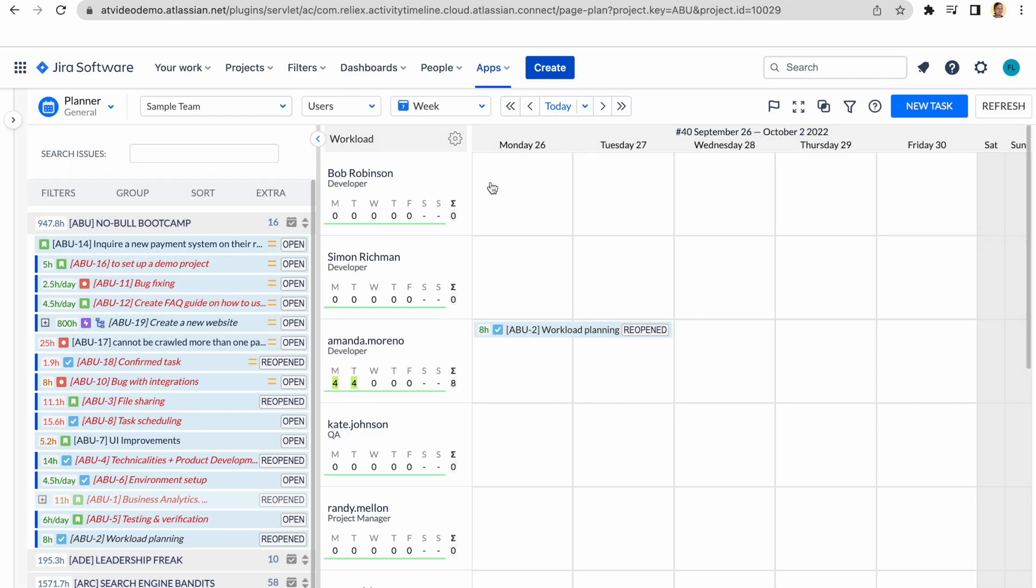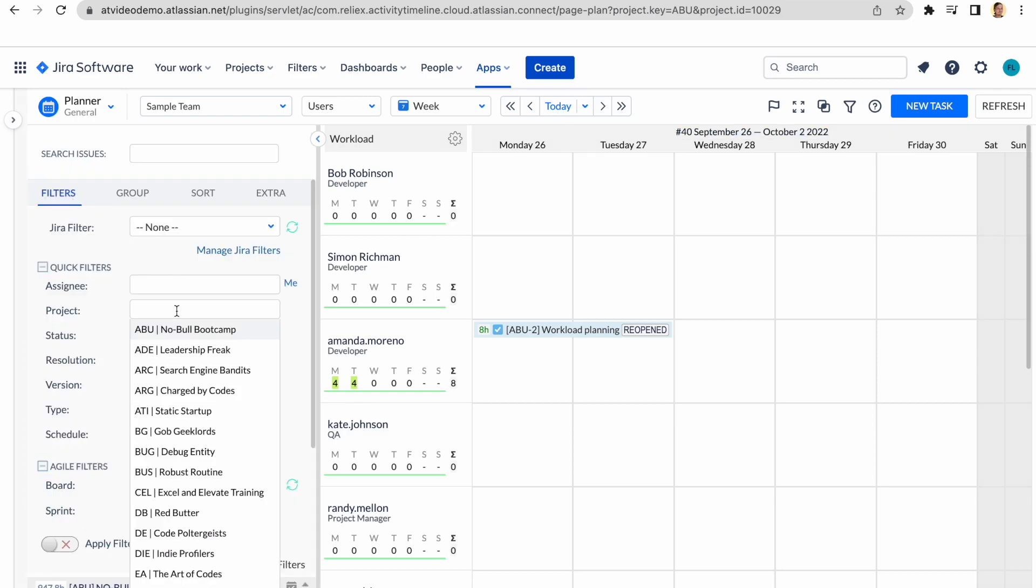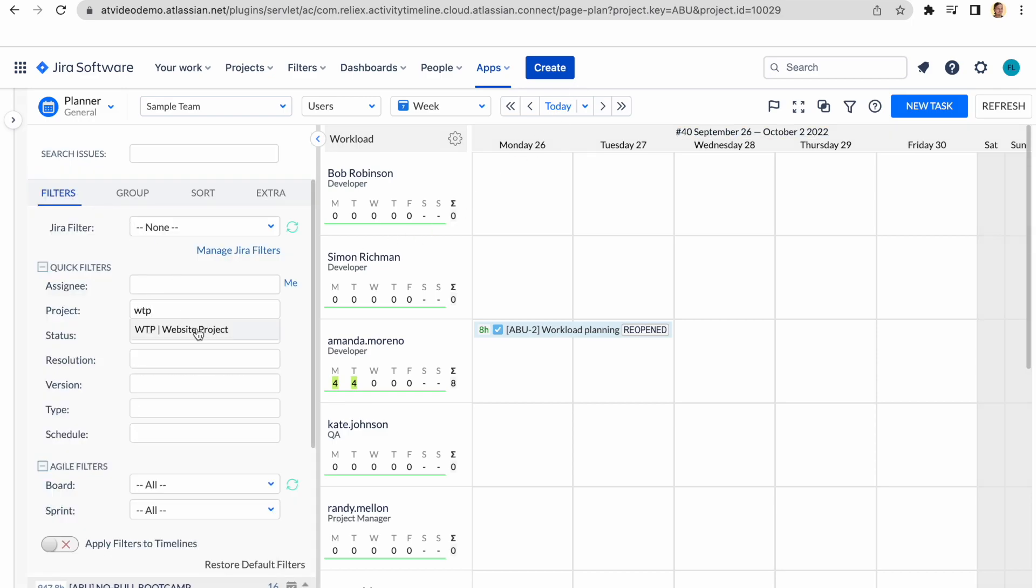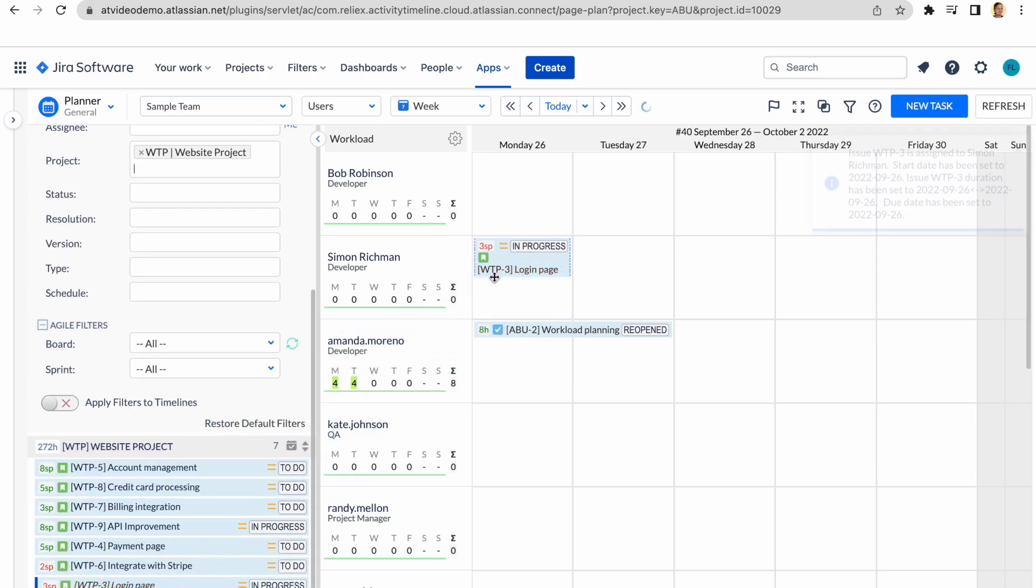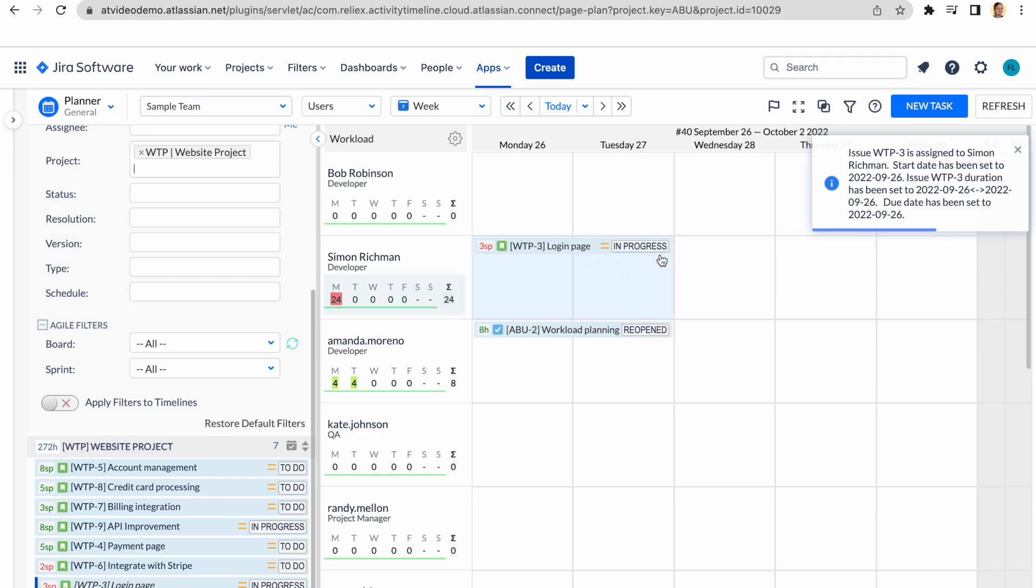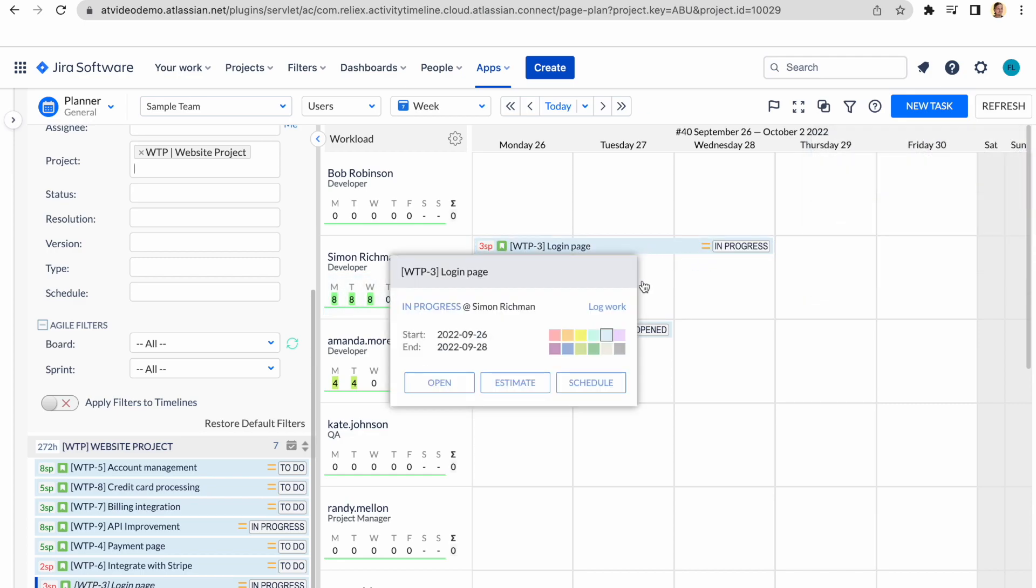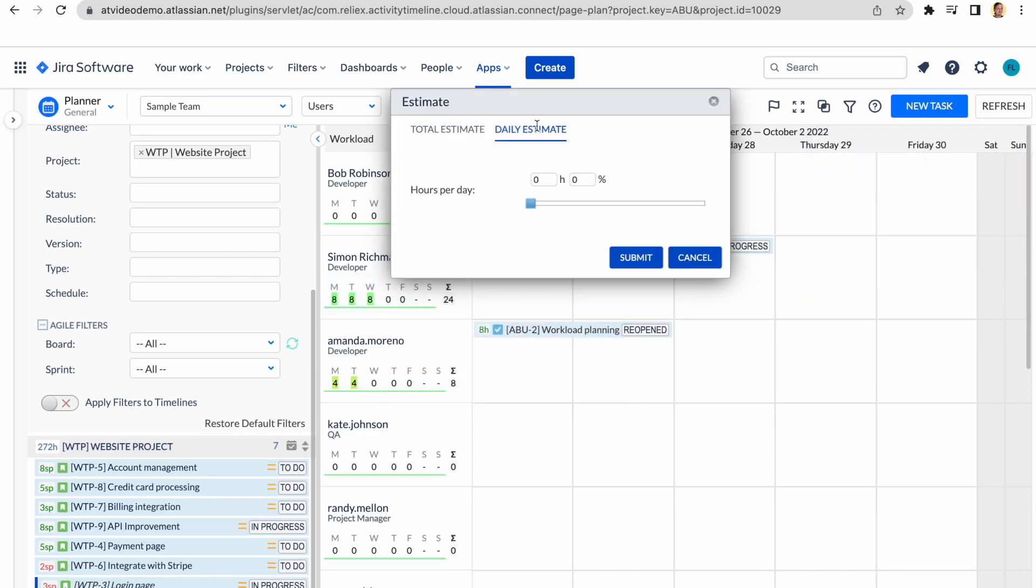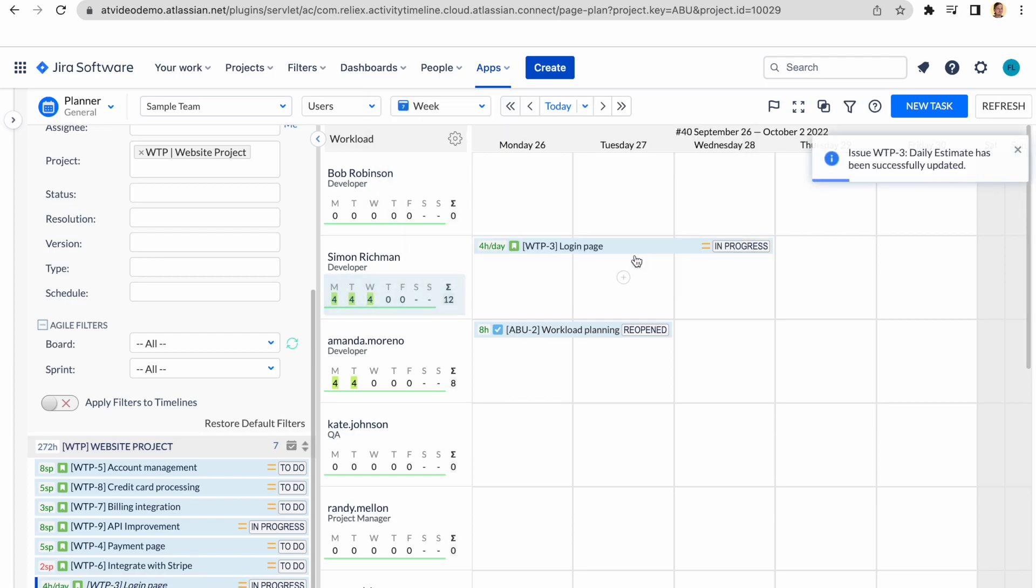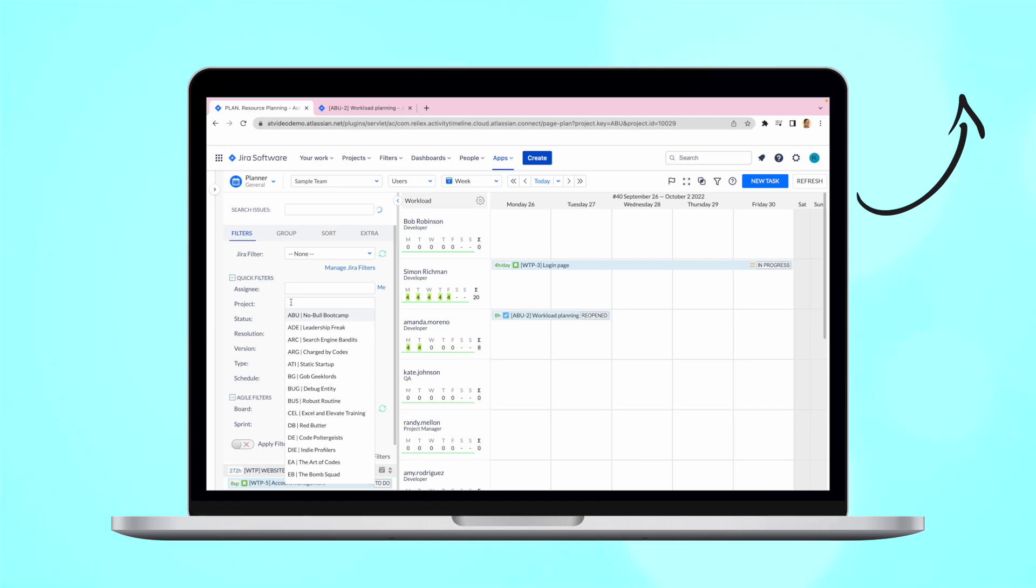Also, it's worth mentioning that apart from standard Jira Time Tracking, Activity Timeline can work with Story Points estimate, if the correct conversion is configured, as the baseline in Activity Timeline is always in hours. Additionally, there is our internal estimate, we call it daily estimate, that allows to show it in the hours per day format. If you would like to learn more about this, we recommend watching our detailed video on the planning module here.